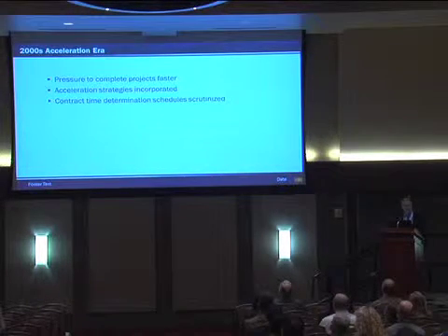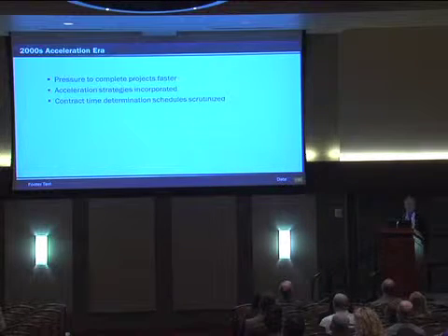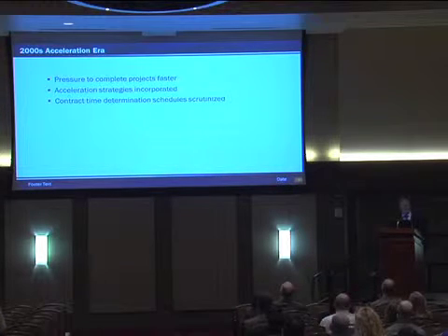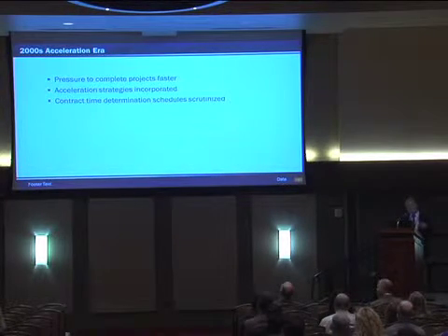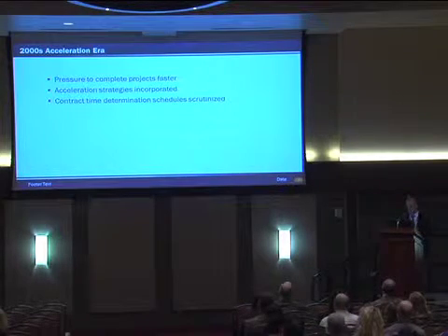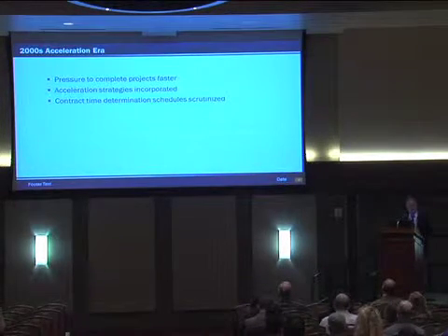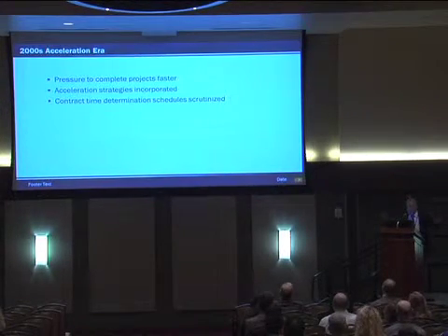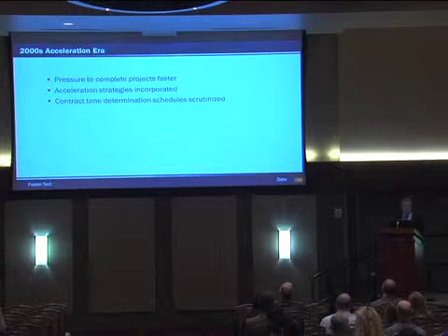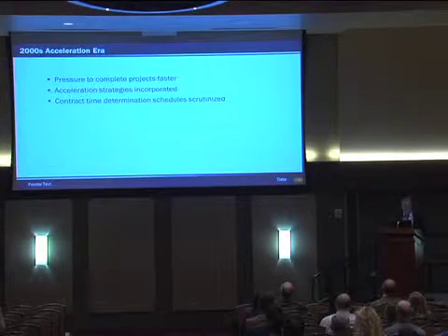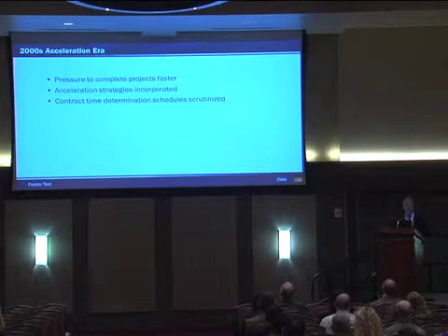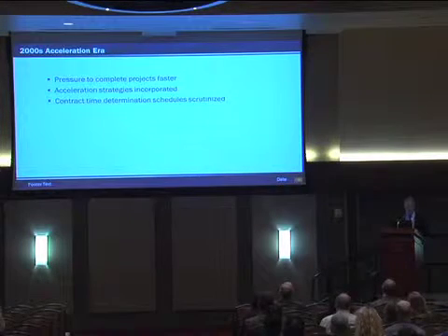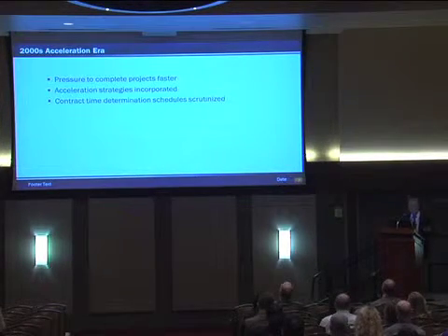The public started going to the legislators and pushing for these projects. They were taking too long. So we started implementing acceleration strategies. This put even more pressure on the scheduling, and we started adding A+B bidding to contracts, incentives, no excuse bonuses, just a plethora of ways of trying to get these projects done faster. And our design group also started scrutinizing contract time determination schedules and making engineers sign and seal them to try to give them more emphasis. So the pressure on the schedule is growing and growing.